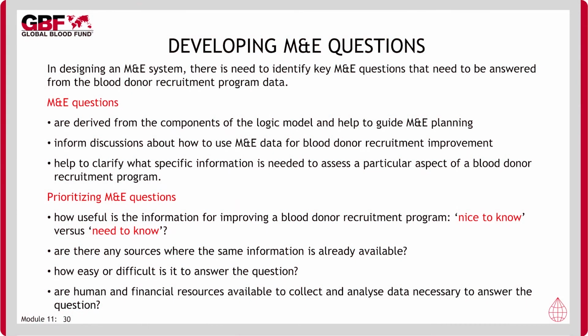In designing an M&E system, there is need to identify key monitoring and evaluation questions that need to be answered from the recruitment program data. These M&E questions are derived from the components of the logic model. The key factors to consider when developing M&E questions include: how useful is the information for improving a program? Nice to know or need to know? Are there any sources where the same information is already available? How easy or difficult is it to answer the question? Finally, are human and financial resources available to collect and analyze the data necessary to answer the question?